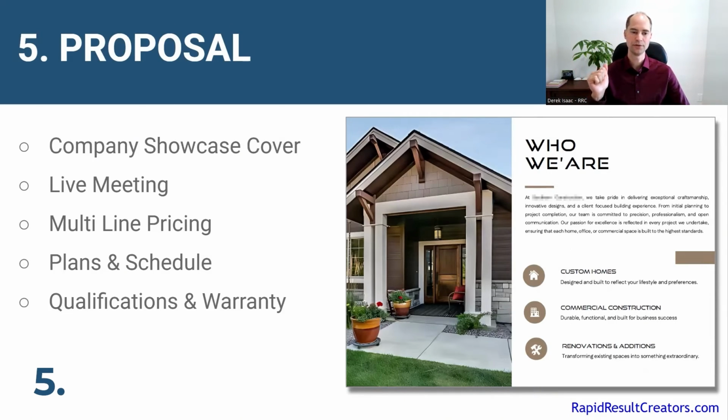On your proposal, make sure you include your qualifications and any warranty. So your builder's license, if you're part of any chambers of commerce, if you've won any awards, whatever it may be. Warranty, not all the nitty gritty, but like you have a 1 year warranty on workmanship, 5 years on foundation or roofing or whatever, right? Just a couple of line items that include a warranty. This is how long. These are the big individual things that do get a warranty, to give them more trust and just make the decision easier for them.